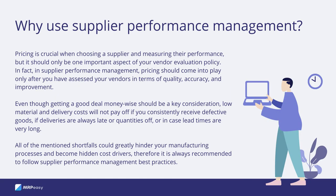Why use supplier performance management? Pricing is crucial when choosing a supplier and measuring their performance, but it should only be one important aspect of your vendor evaluation policy. In supplier performance management, pricing should come into play only after you have assessed your vendors in terms of quality, accuracy, and improvement. Low material and delivery costs will not pay off if you consistently receive defective goods, if deliveries are always late or quantities off, or if lead times are very long. All of these shortfalls could greatly hinder your manufacturing processes and become hidden cost drivers.